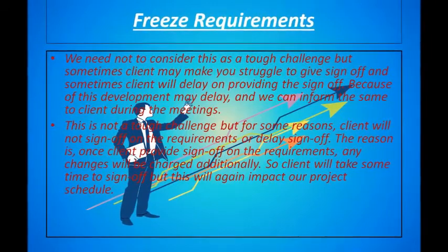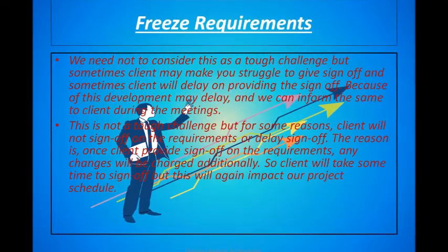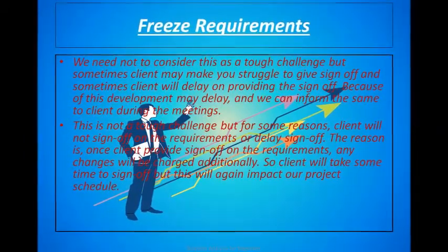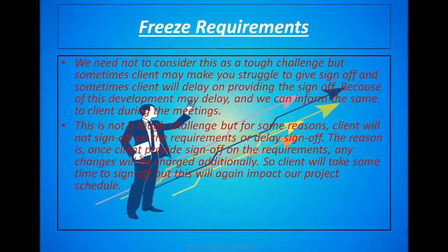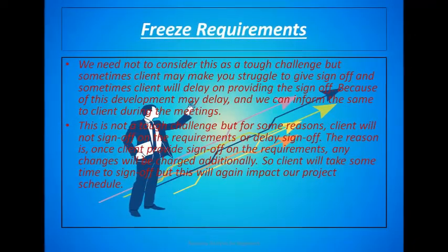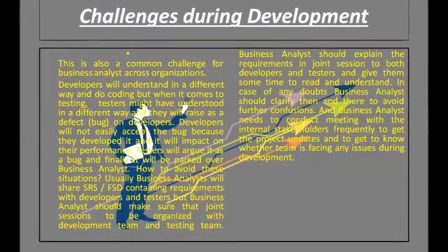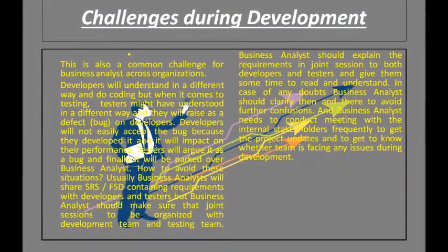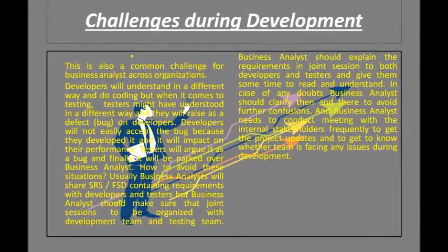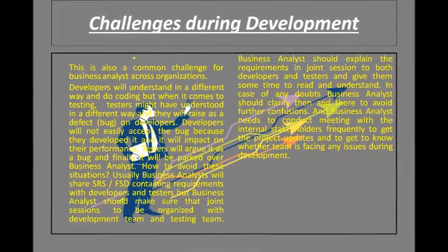Freeze requirements. We need not consider this a tough challenge, but sometimes clients may make you struggle to give sign-off, and sometimes clients will delay in providing the sign-off. Because of this, development may be delayed, and we can inform the clients of the same during the meetings. The reason is, once the client provides sign-off on the requirements, any changes will be charged additionally. So clients will take some time to sign off, but this will again impact our project schedule.